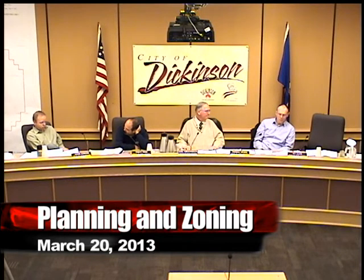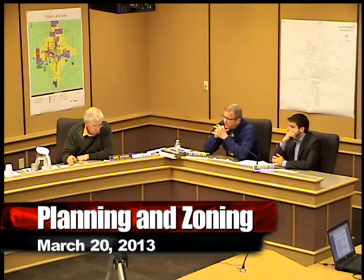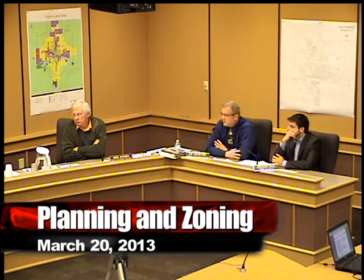Well, yes, on the final plat on the parks, if it's ultimately determined from the Parks District that they want a park on Phase 1 or Phase 2, then that's left up to, ultimately it will come back to you to make that call, and a revision would be necessary. The key is that on the final plat, you don't have significant changes, but if you're reducing it for a greater good, like I'm saying for a park, then going from preliminary to final and then putting a park on there, they just lose lots and maybe reconfigure some of the roads. So I don't see that has to come back through the entire preliminary plat stage. We can address that and they just show a park dedication as part of their final plat approval.